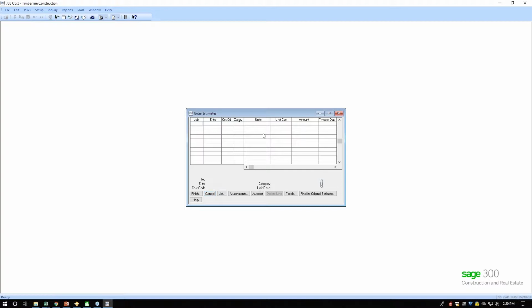Now, when I used to teach people how to enter estimates, if I was working with a project manager, they might say, well, why am I doing this if I've already entered commitments? Why am I doing the estimate here? And I'd have to navigate this. So the concept is I might have what I think something might cost, $20,000, but I might be able to get it bought out, to get a contract with someone for $18,000.